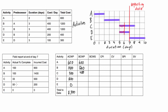For activity D, we completed 50% of the two-day activity, meaning one full day of work was accomplished. We budgeted $200 per day, so the BCWP for activity D is $200. Activity E's BCWP is zero since it hasn't started. Adding these up, the total BCWP to date is $2,400.